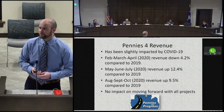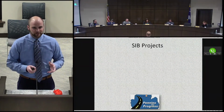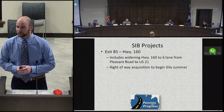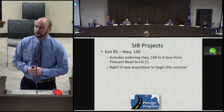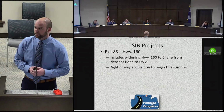That's very nice. I did want to give a quick update on the 2 SIB projects, Exit 85 and Exit 82. These were approved by the SIB board for us to get funding for the construction of them. Exit 85 is already an active project with DOT. Spoke with them today, and they are planning to start right-of-way acquisition this summer on that project.